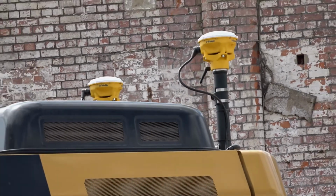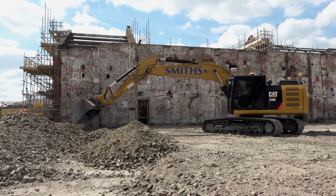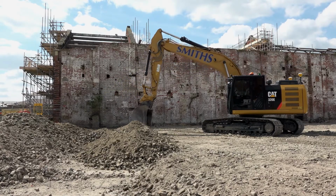With regards to doing that, we can monitor it all the way through the process of the cut and fill and the earthwork stages. We've got a check on everything we've done. So each day the engineer goes out and does a survey and we can feed the information back from the machinery at the end of the day back into Business Centre and we can run reports.